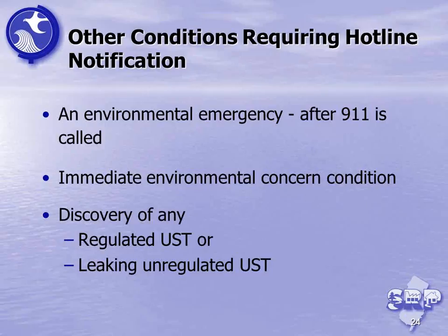And just while we're on that, just to expand upon the UST issue a little bit, I know it's covered in the guidance, and also Tessie touched on this. Many linear construction entities, just for the sake of not wanting to disrupt the schedule, will decide to remove the tank or tanks. If they do and there's a discharge, then as per the last slide on Tessie's presentation, that would kick you into the LSRP program, and you would have to undertake the delineation and remediation according to the ARCs and the tech rules.